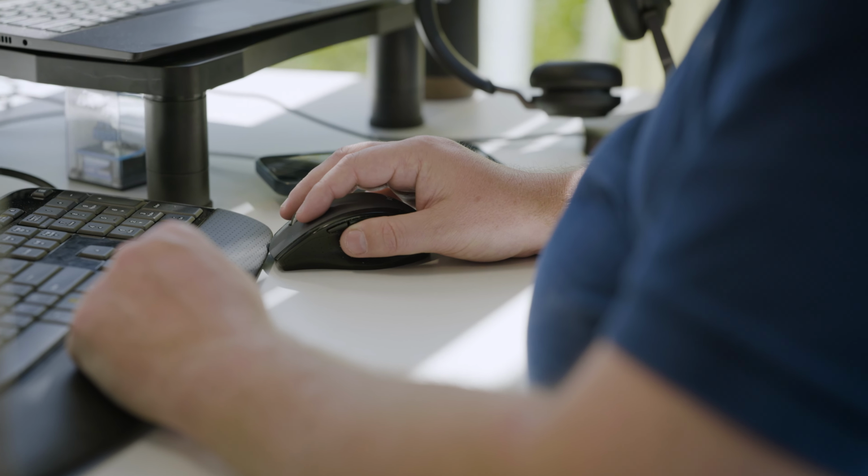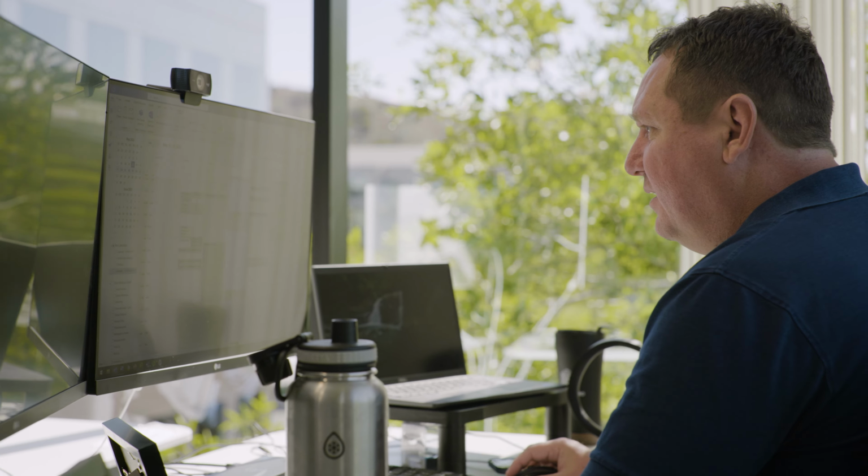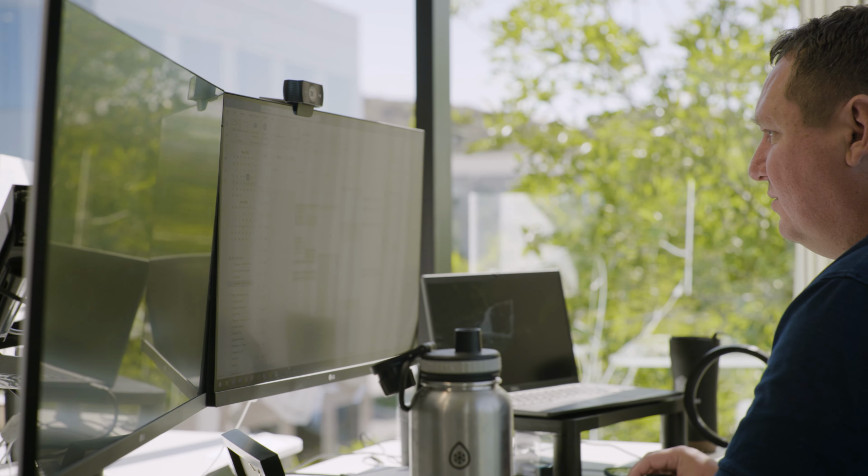The idea behind these workshops is a really simple one. We want to create a shared understanding and transparency as soon as possible between us and the customer. What was different about this project was that the CoorsTek and Andea implementation teams had a series of upfront, over-the-phone planning meetings before the workshop to agree on a high-level, rough proposal and vision. This allowed us to create a united front when talking and performing the workshop and to control scope and expectations from both sides of the fence.